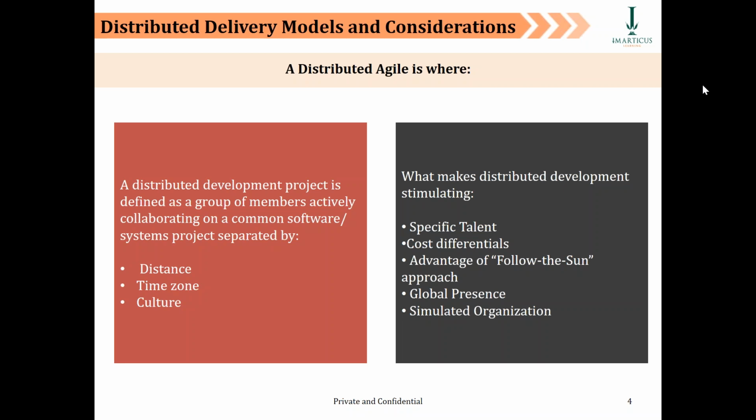And in case you have a US team, they will be able to do a handover to the China team when they are logging off in their evening and China has already come alive in their morning. So that's the follow the sun approach.